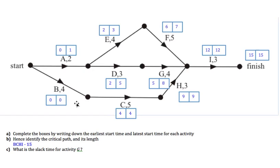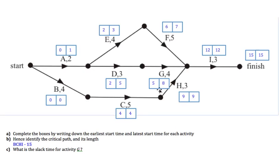For question C, the benefit of having the boxes set up is that it's easy to work out slack time — it's just the difference between the latest start time and the earliest start time, representing how long an activity can be delayed before impacting the project. For Activity G, the earliest start time is 5 and the latest start time is 8, so the slack time is 8 minus 5, which equals 3 — whatever unit of time the question uses.